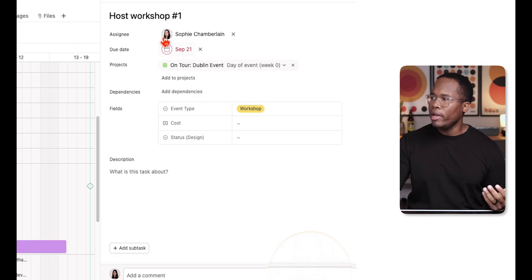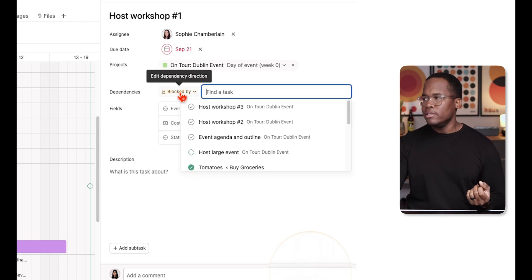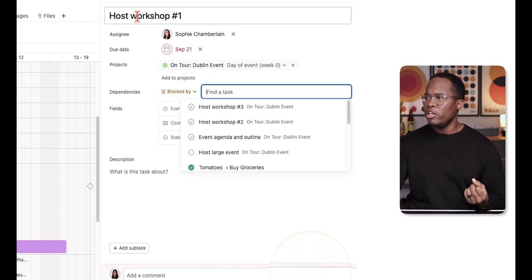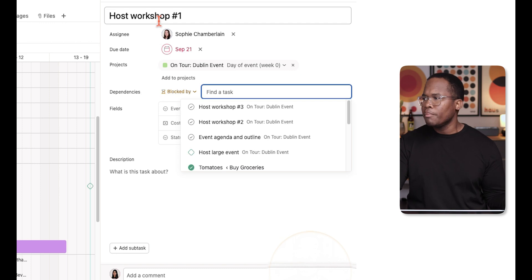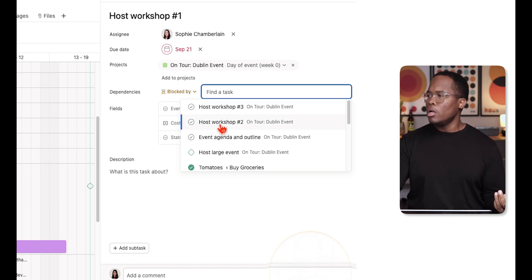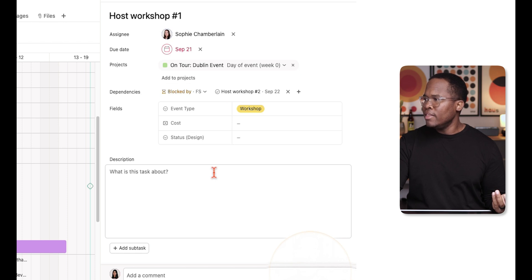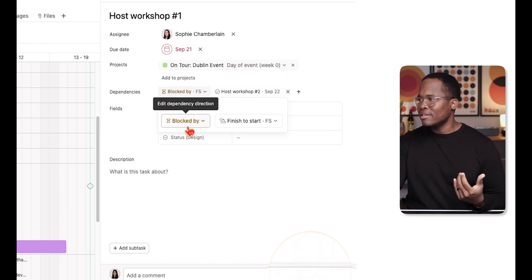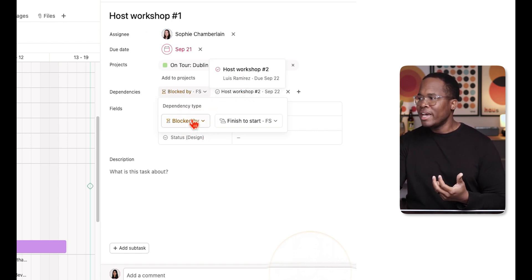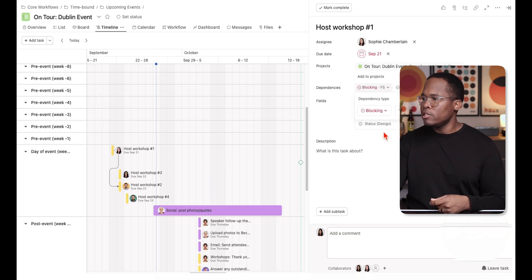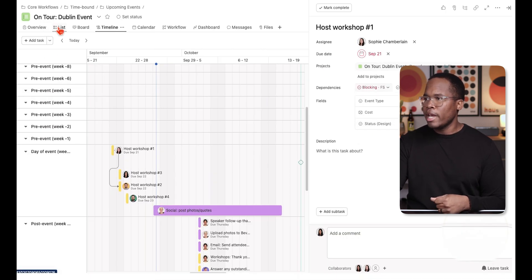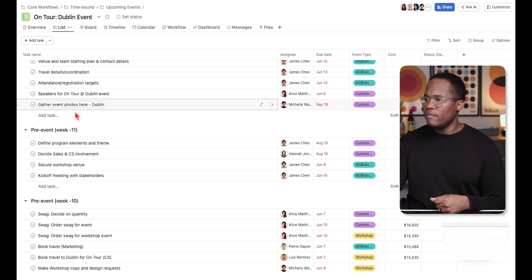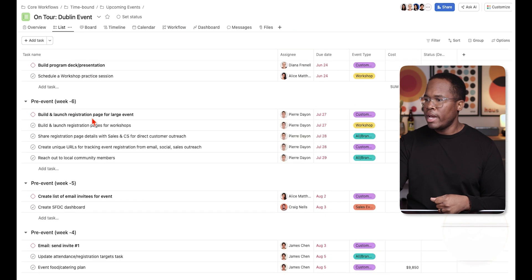There are a couple of ways to do it. In the task detail view, you can click 'Add Dependency' — for example, to make sure workshop number one needs to be completed before we can start on host workshop number two. Right now it shows the task is 'blocked by,' meaning you can't complete this task until the other is done, so I'll change this to 'blocking.'